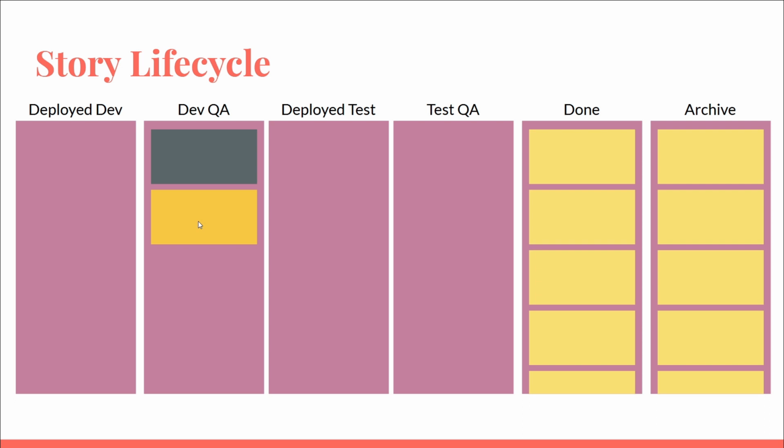And if I can break it, then either we need to move that ticket back to in progress and fix that, or we need to create a bug ticket for it. It depends on whether or not it's okay to move forward. If we deploy that to prod, would that be okay? And sometimes the answer is, oh no, you don't want to deploy that to prod until we fix that. And sometimes the answer is, yeah, it's probably fine. That's a really rare edge case that it's going to be pretty unlikely anyone will run into. But we should still fix that bug really soon and get that in maybe later today or tomorrow. Get that bug fixed before people run into it.